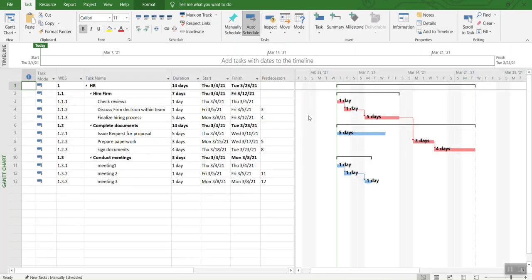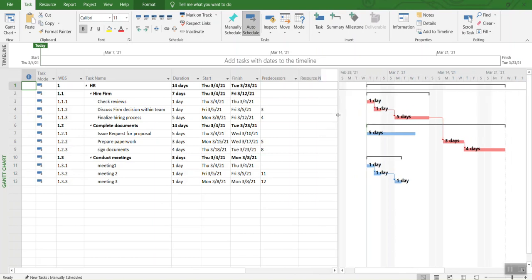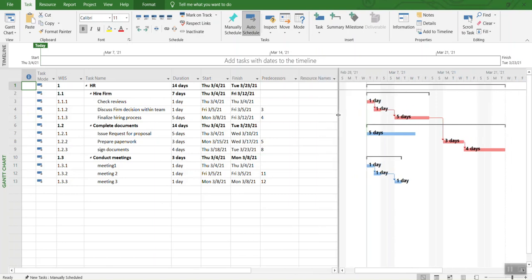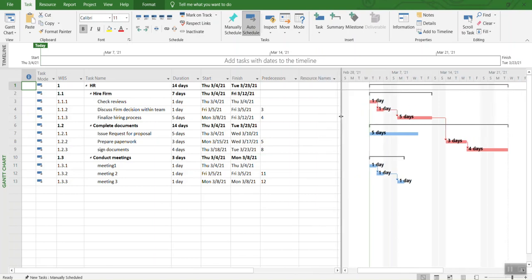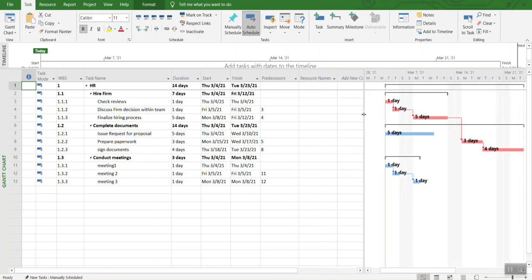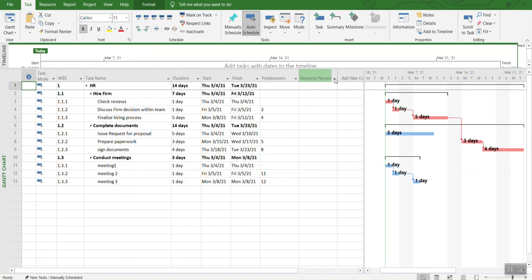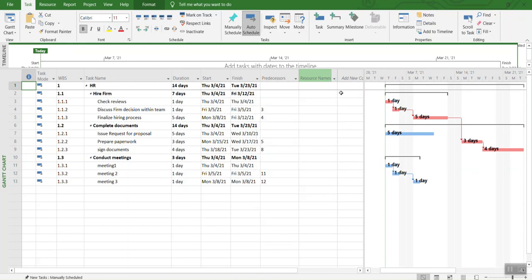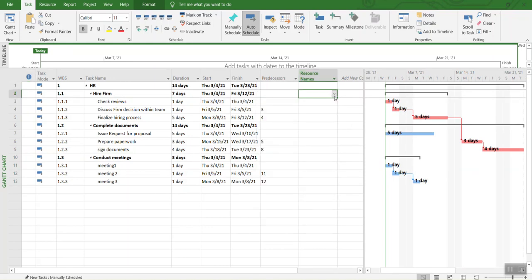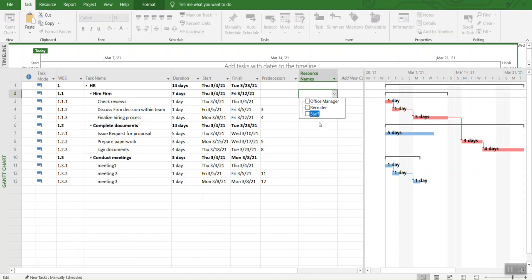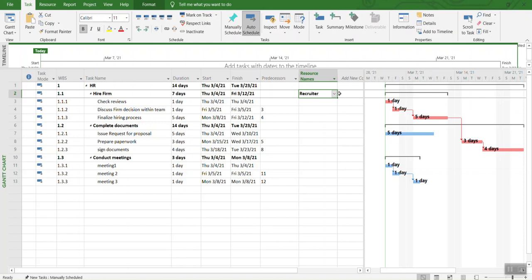Over here, you have different columns and one of them is resource names. What you can do is select resources for each task. For example, for hire firm, we need a recruiter. So you selected recruiter over here.